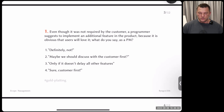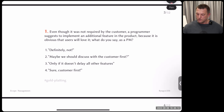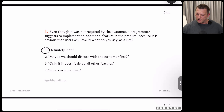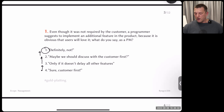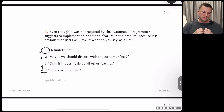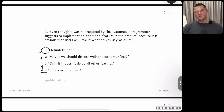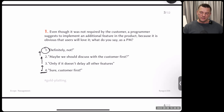The right answer to question one is number two — discuss with the customer first. The answers go from worst to best: number four — saying yes immediately — is completely wrong. It leads to immediate scope creep. Someone in the audience correctly named it. When you immediately accept the functionality, the scope just gets bigger while the other elements of the triangle stay the same.